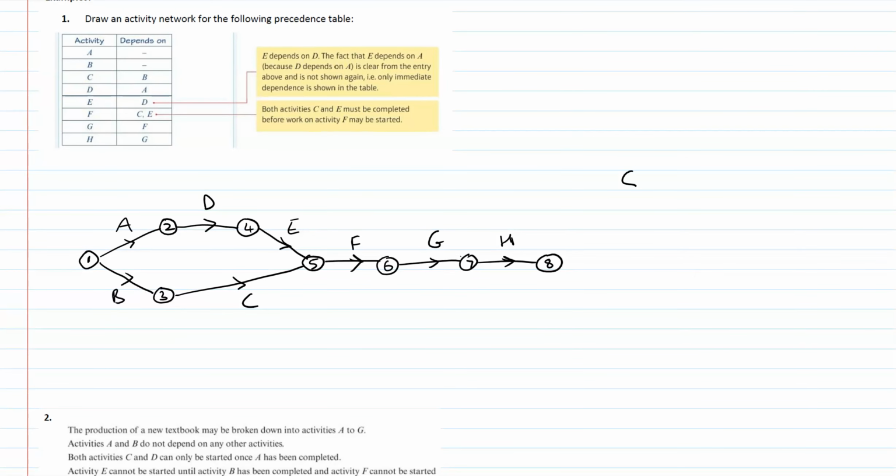And that will be on our activity network. We tend to use straight lines for the arcs as well. And you don't really want them to cross. Also, we'll come on to this later, but we can't have two activities going from one node to another like this. We don't write this either. If we feel like we need to do that, we'll talk about how we do that later on.